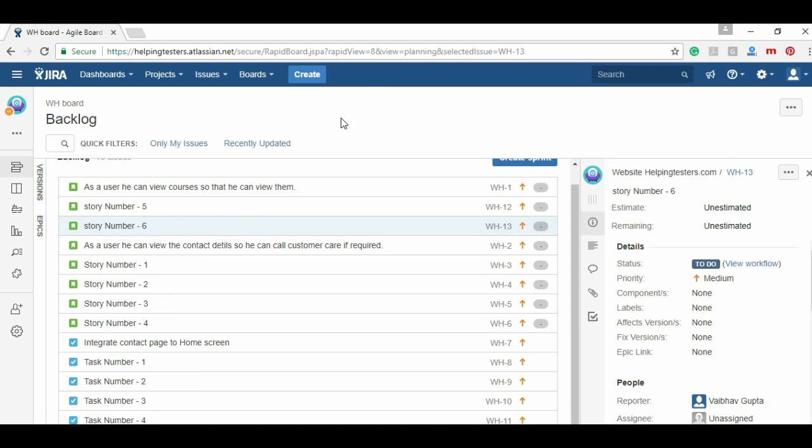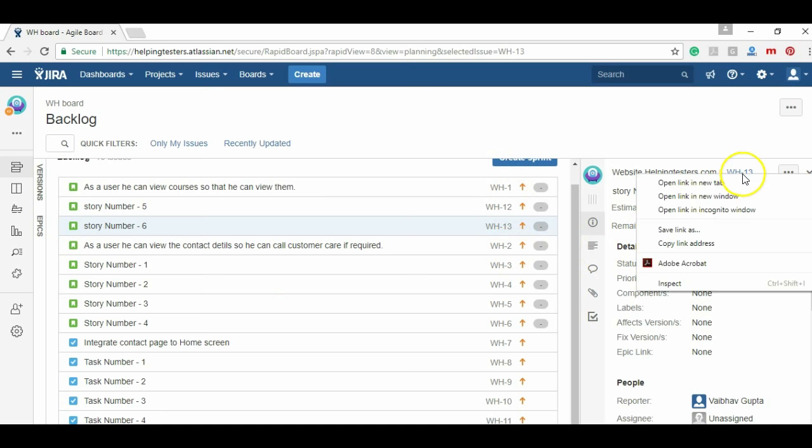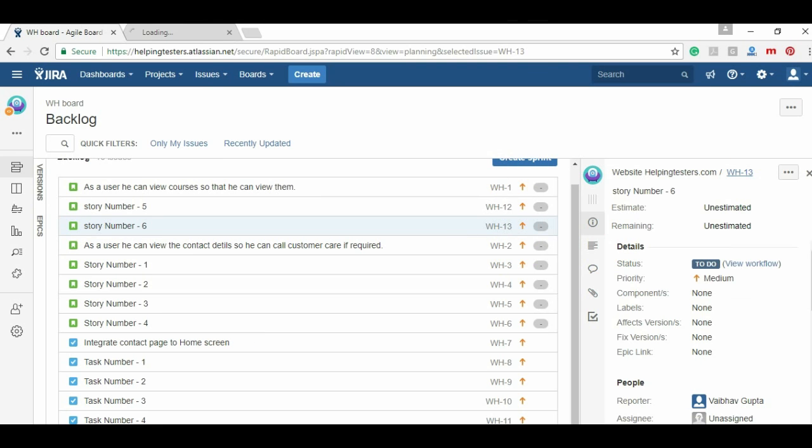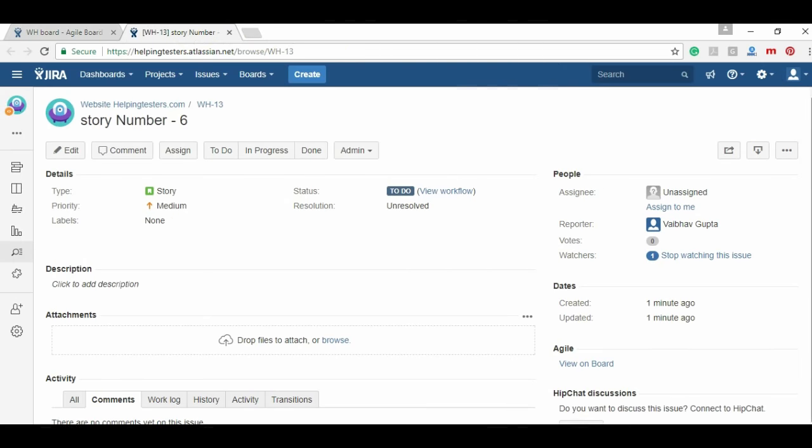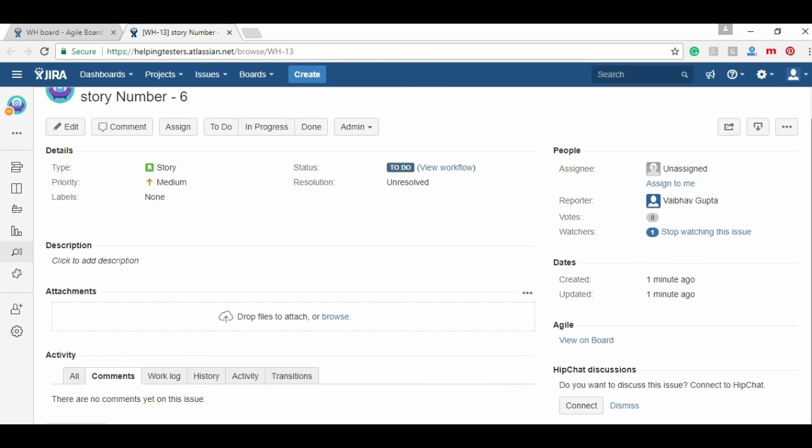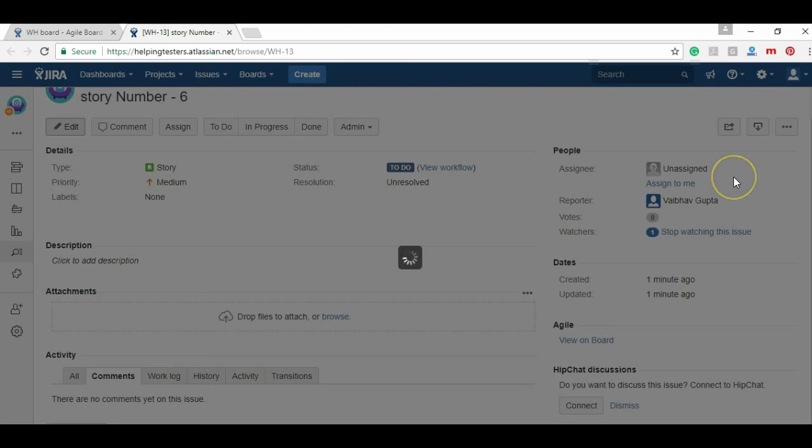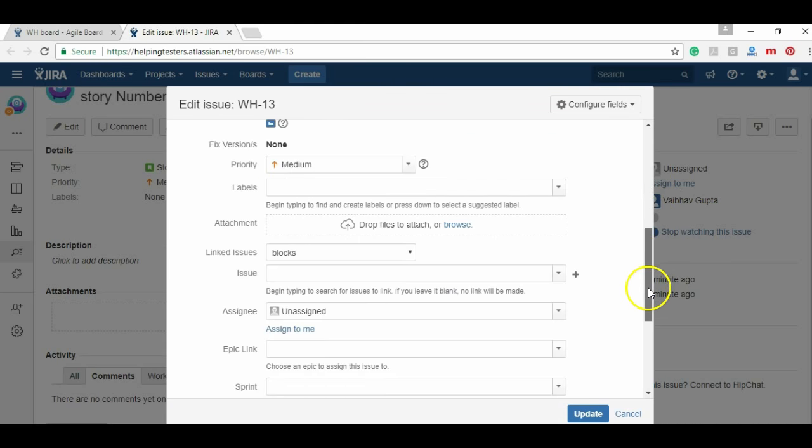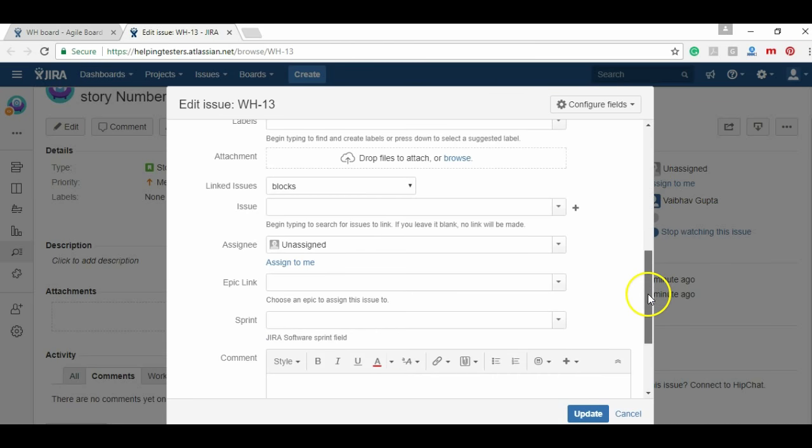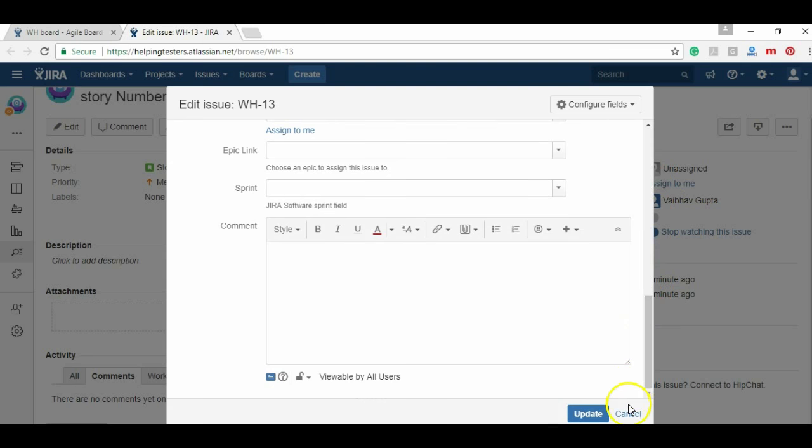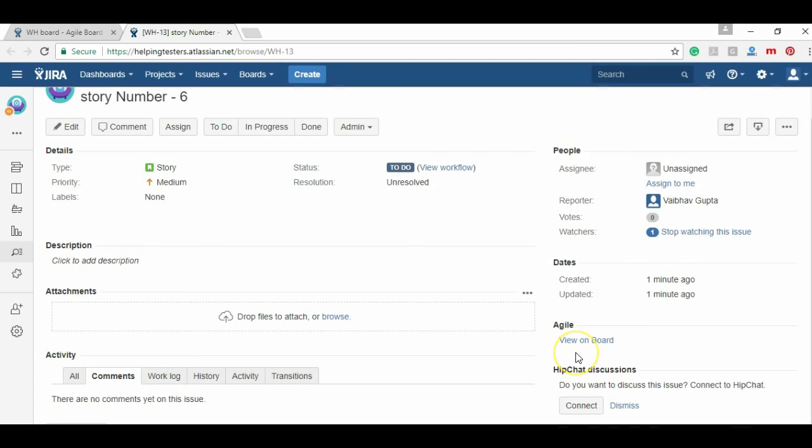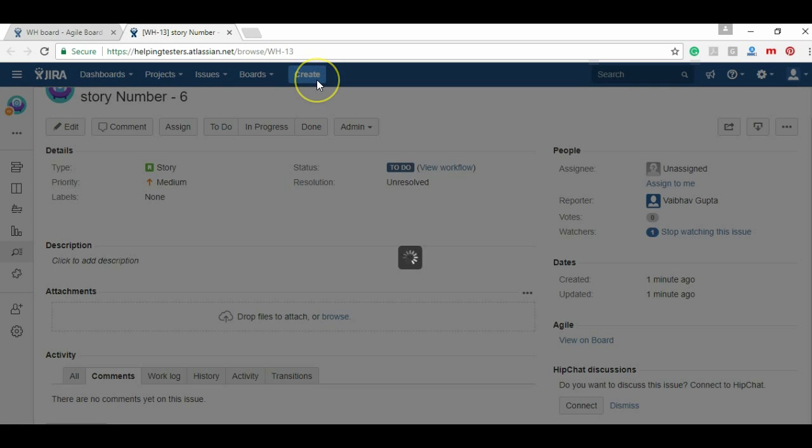So once the backlog is created, the project manager knows what tasks need to be done. He will arrange a project meeting. He will call all the developers, testers, and they will be sitting together - all the team lead - and they will be estimating each and every story and task, how much time it would be taking. If you open any task, it's a story, you will find a time estimation field. The reason is because our project is not configured for showing the times. Later we were using the sample project, so it may be configured, but not. Let's go - you must be having the admin credentials for it.